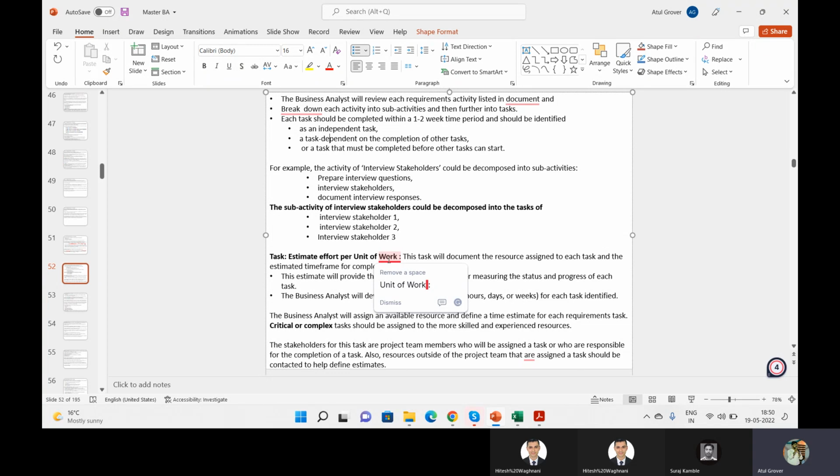He said, I say 3 because it is not mentioned whether this field is already available in the table, or whether I have to create the field in the table as well, and then bring it to the form level. Then as a BA, I say no, it is not available in the table. Okay, then we need the 3 points. This is how agile estimation, or story or sprint planning, actually works. It is a very interesting concept.